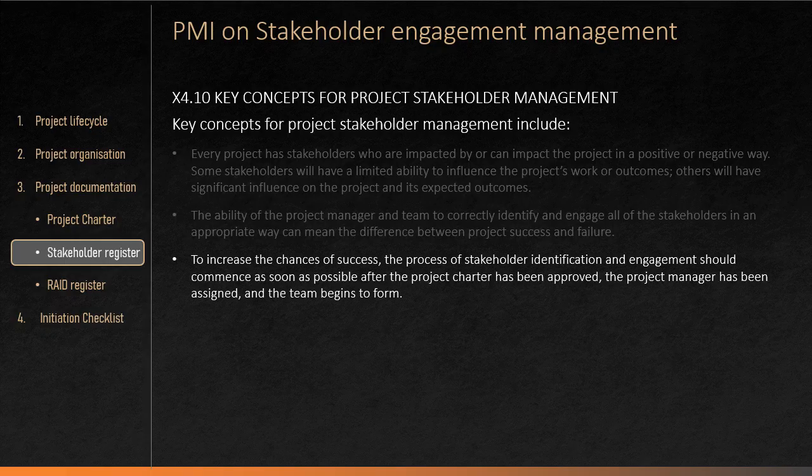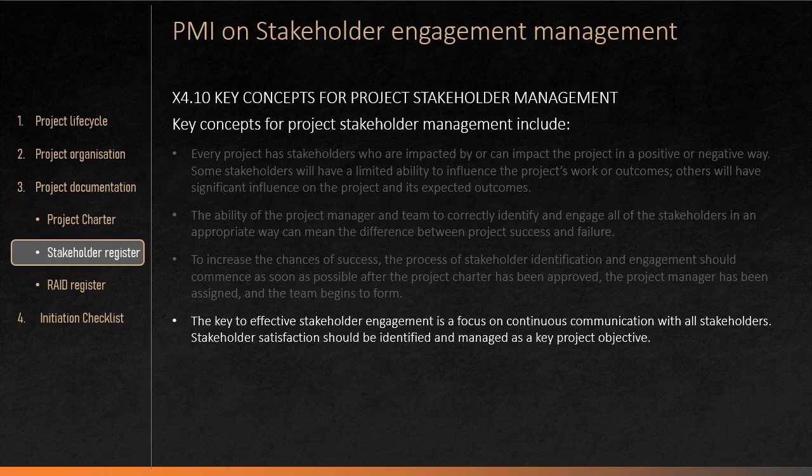And to increase the chances of success, the process of stakeholder identification and engagement should commence as soon as possible after the project charter has been approved, the project manager has been assigned, and the team begins to form. The key to effective stakeholder engagement is a focus on continuous communication with all stakeholders. Stakeholder satisfaction should be identified and managed as a key project objective.